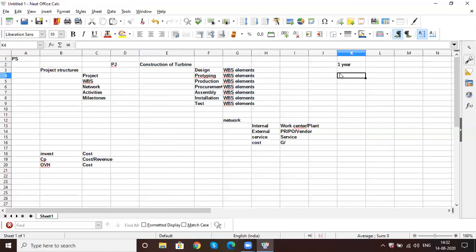So which means, let's say starting from Jan 1st till 31st of December, the whole project has to be completed. So what you are telling the customer is, I will be dividing this whole project into multiple phases, like 4 phases. So after completion of 25% of a project, you need to release 40% of your payment.